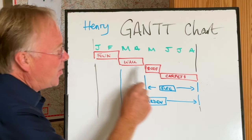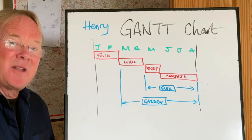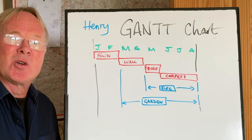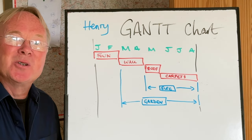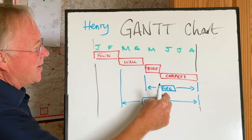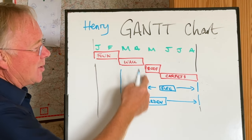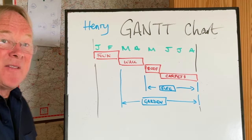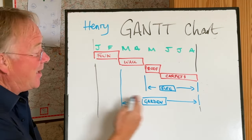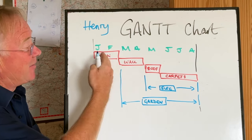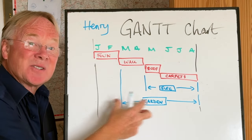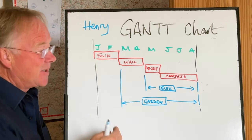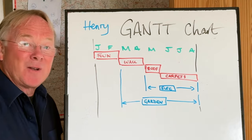You've got your critical path, and then you've got some floating tasks, where you've got a bit of choice about when you do them. So the electrical bit — as soon as we've got the walls in, we could do it anywhere in this space. And the garden, we could do any time after the foundation — so that's a floating task. You have critical tasks and you have floating tasks.